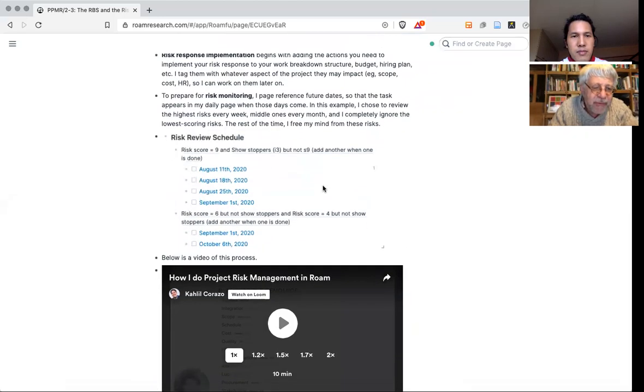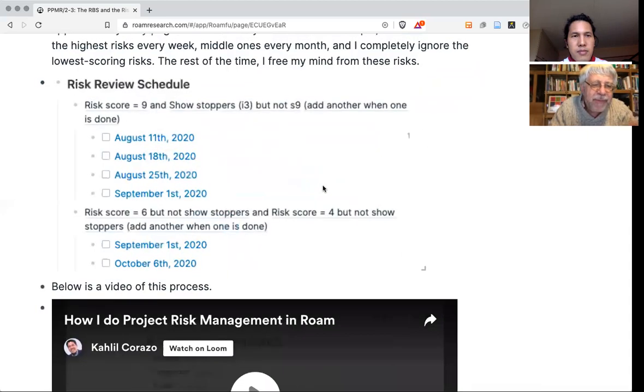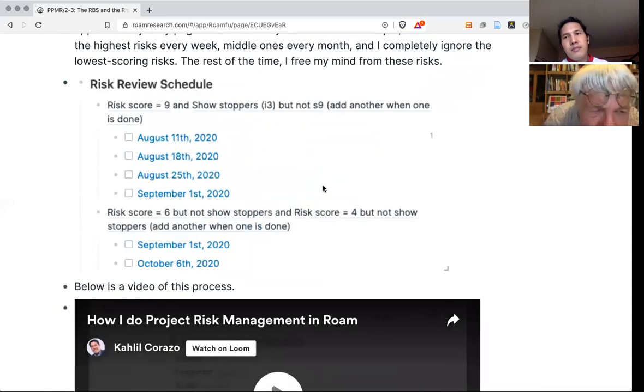That was the risk review, 9 and showstoppers. Okay. So 9, you do it every week. Okay. And then the next is 6, and you do every month.